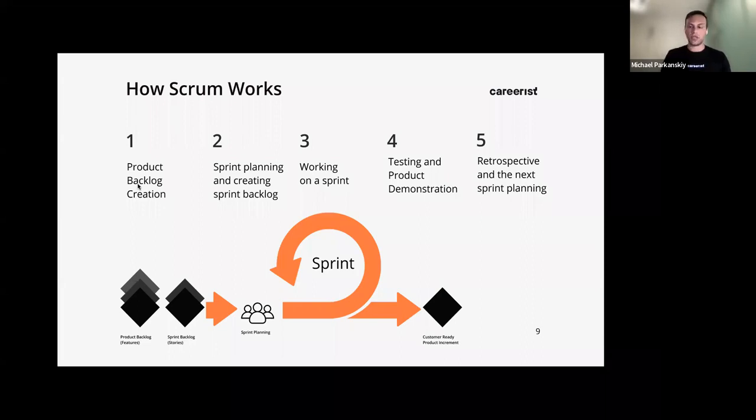And the sprint is going to go 2 weeks. So, new sprint started, you're building features, you're fixing bugs. 2 weeks go by. At the end of 2 weeks on Friday, you get on the call. How did we do? Did we get everything we wanted to get? What got through? What didn't? Okay, this didn't get through. We'll try to work on it the next sprint.